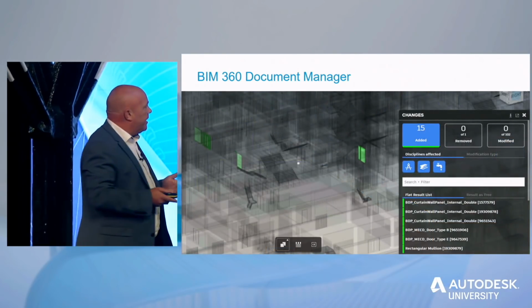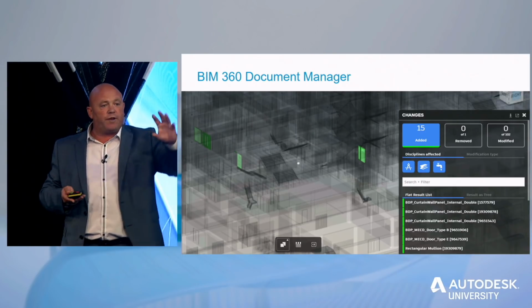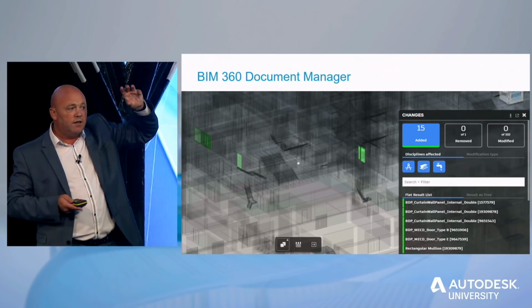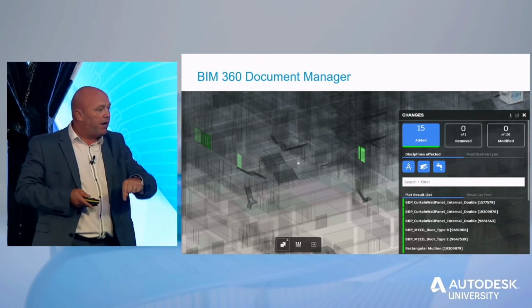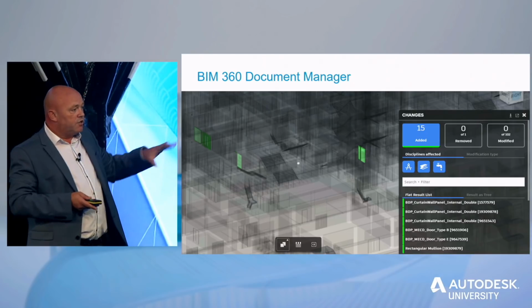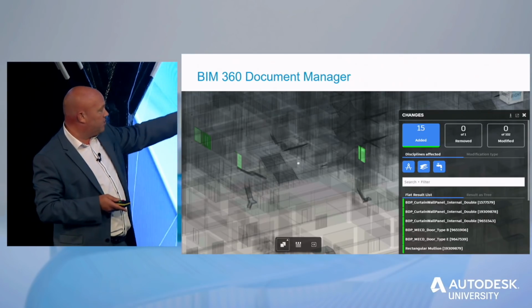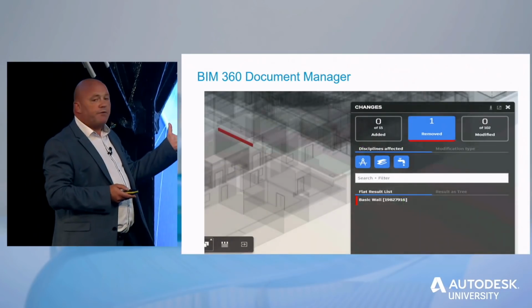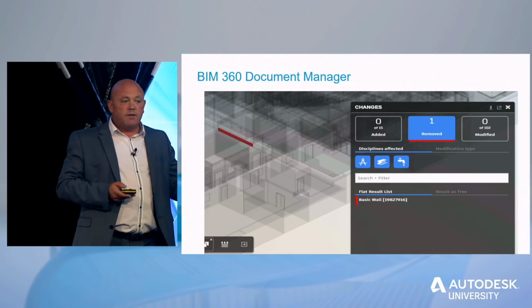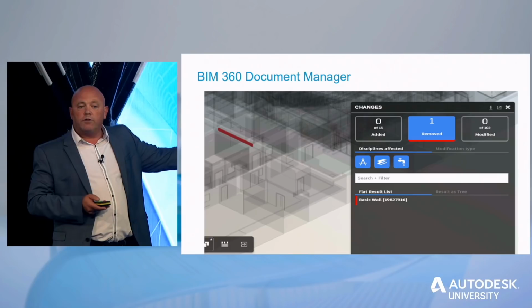We could have a look at any additional doorways that we had to put in to get this existing equipment in, because don't forget we had 8 facilities that were moving. So all the existing equipment that was coming from those facilities had to come back into this new facility. So as part of the RDD process, that existing equipment was coming in, but we had to look at additional doorways and things as well. And also anything that's been removed. Sorry. So we need to check and look at what we're ordering, so we don't over-order things as well.